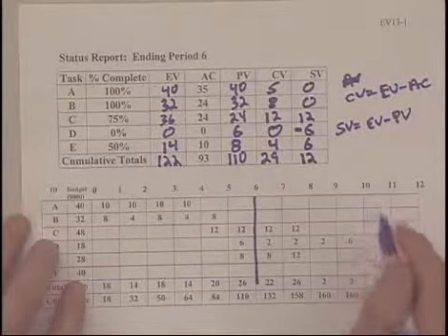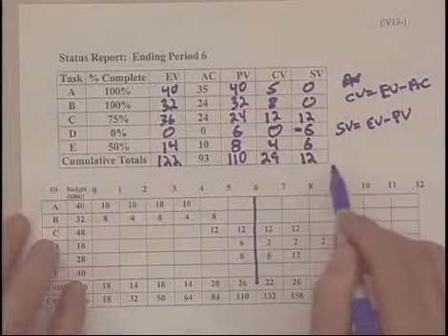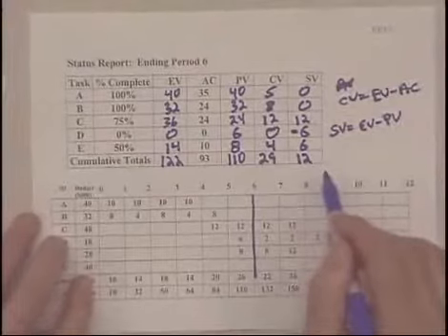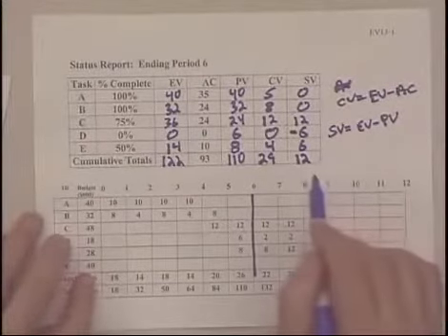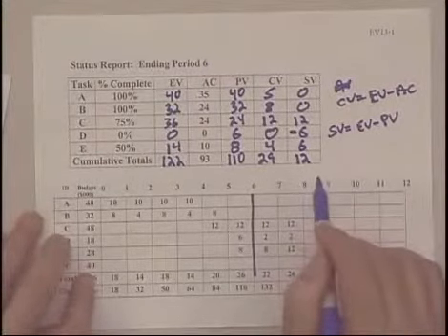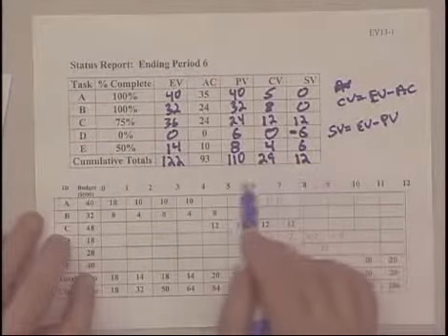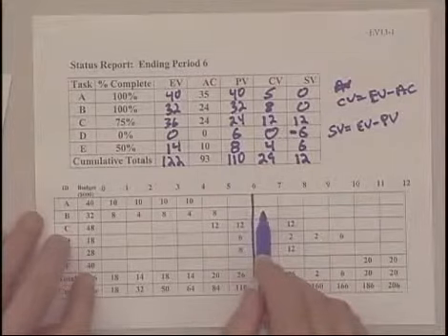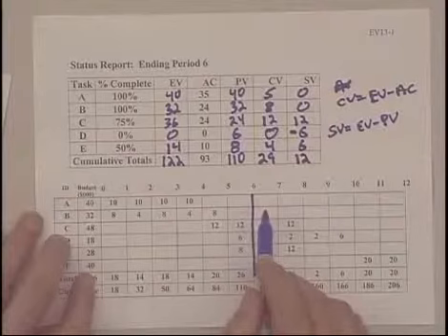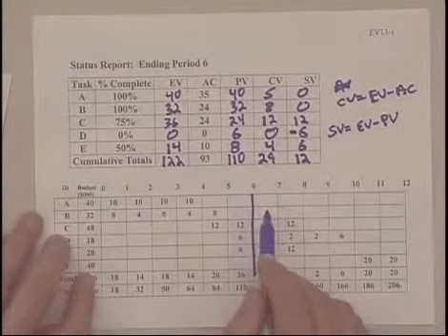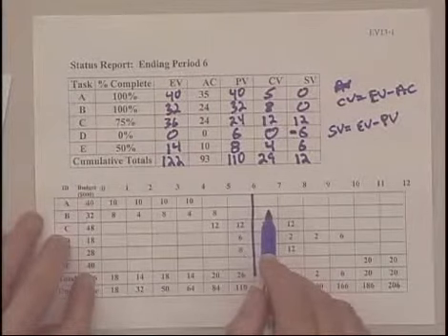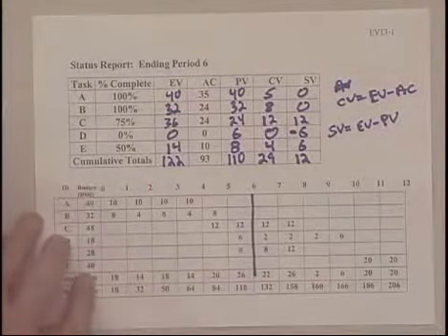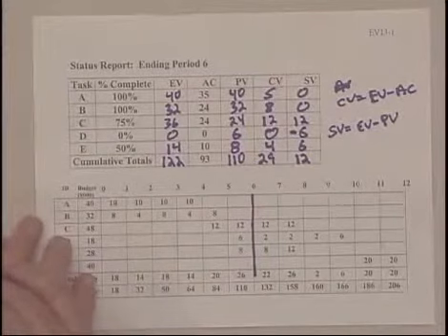6th period. Now, this raises an interesting issue in terms of, are we really ahead of schedule? And one of the limitations of schedule variance is that schedule variance doesn't differentiate between critical and non-critical activities. If you go back and look at that original network, and you should do that now, you'll see that activity D is on the critical path. And the non-critical activity, E, is already ahead of schedule.